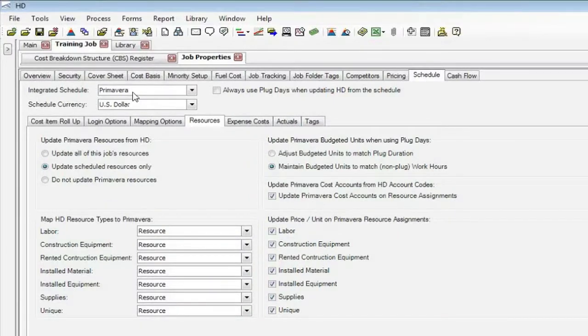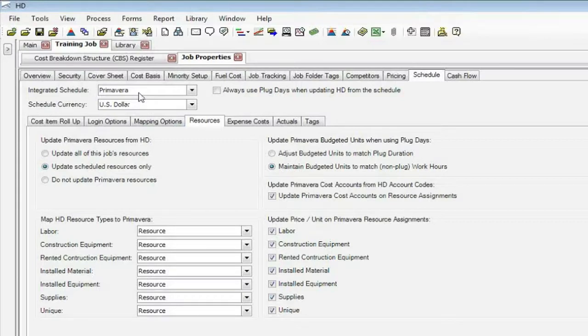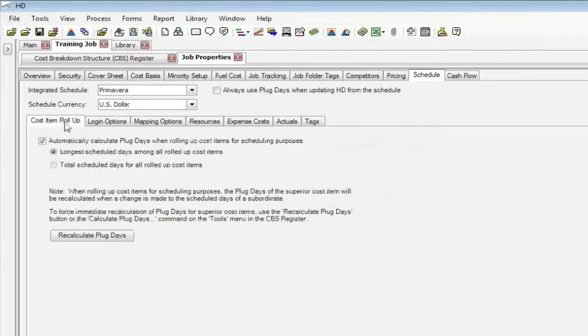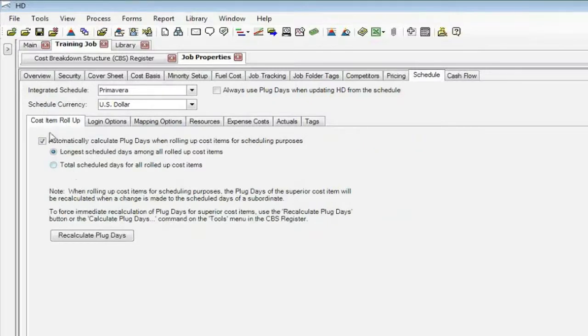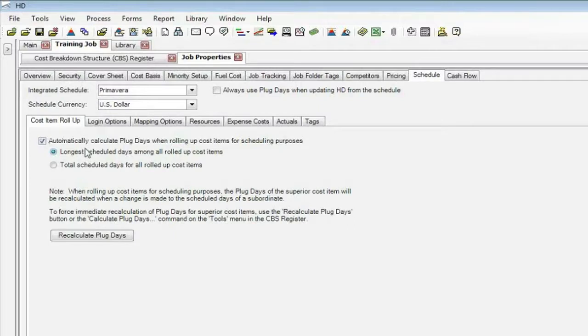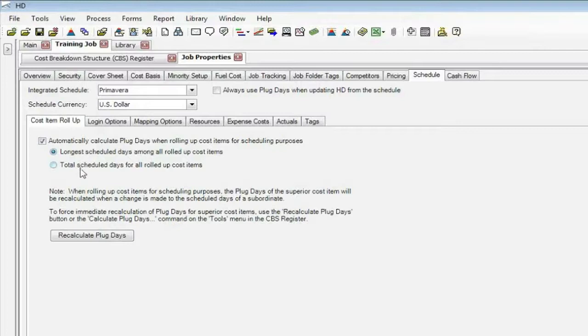Of course, this is where you decide which system you want to use, either Microsoft Project or Primavera. I'm going to quickly go through these tabs. This one here has to mean that when you want to roll up the cost items, in other words, you want to send out a Level 1 or Level 2 instead of all the subordinates, which duration would you want us to use? So we can add those subordinates' durations up or use the longest.